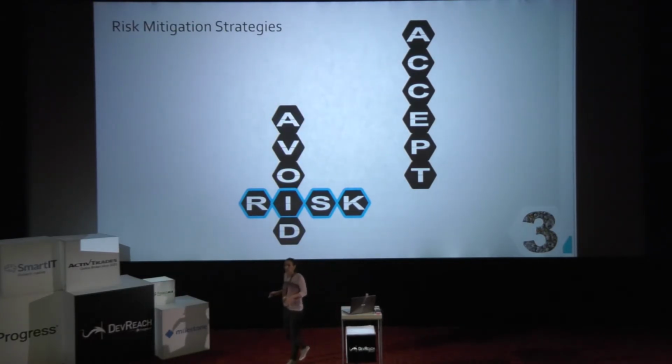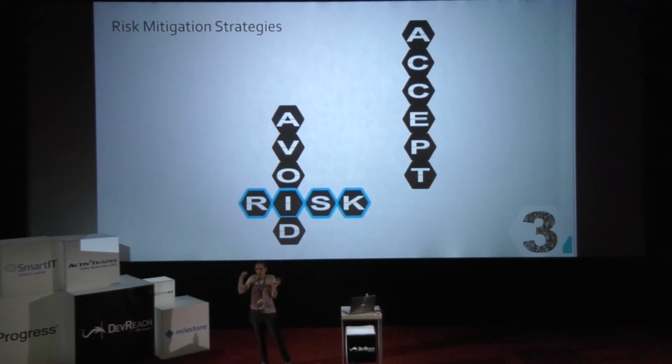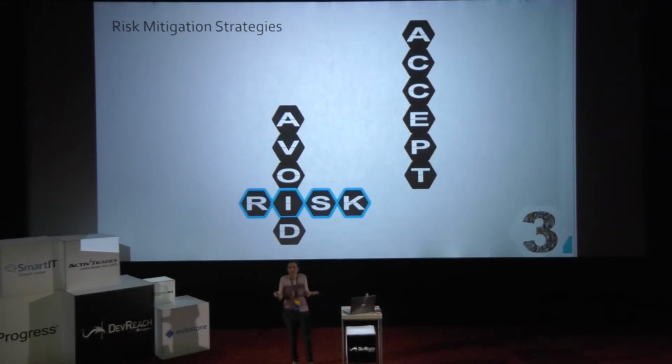Number two is completely opposite. It is risk avoidance. So you will do anything in your power just to eliminate the exposure to any kind of risk by changing the parameters of your project. By eliminating the risk, you can sometimes change the scope of your project. And this strategy usually occurs when the team leader refuses to be engaged in activities that will induce a risk. So you should be careful with this one, because by trying so hard to avoid one risk, you can unconsciously create a set of new, unknown risks that can have a higher impact on the project than the one that you tried to avoid. So this is the most underutilized strategy of all of them, and it is the most expensive one of all the strategies.